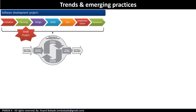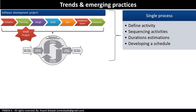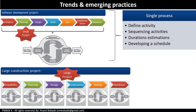What are the trends and emerging practices? The complexity and size of a project will have impact on how project schedule management is done. In smaller projects, we can create a single process — activities like defining or identifying activities, sequencing them, duration estimation, and developing a schedule model are all done once. Schedule planning and schedule development is done as part of the planning process group once in the entire project. However, in large projects, these activities will be repeated in each phase. It is also important to consider time and level of effort required for knowledge management, risk management, benefit management and other value-added activities in scheduling. In innovative or one-of-a-kind projects, the team may spend a lot of time on these activities.